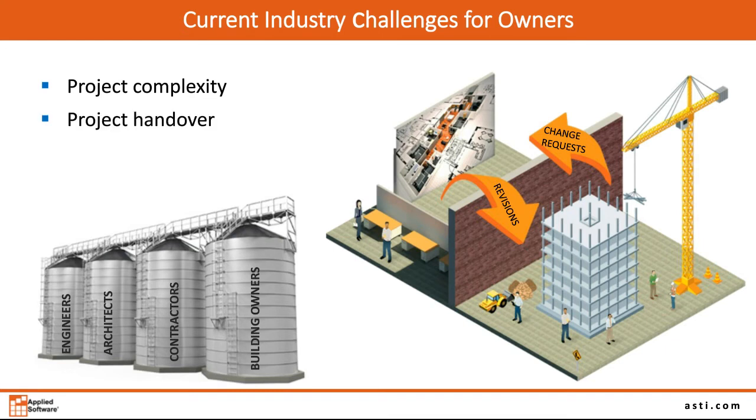The owner may have mandated and driven a BIM process and paid for rich asset data to be developed during the design and construction phases. All too often, that rich information is not seamlessly transitioned to the operations teams for use in managing the facility. It's common for owners to start building operation activities without a populated CMMS maintenance management solution, even though the data is there.